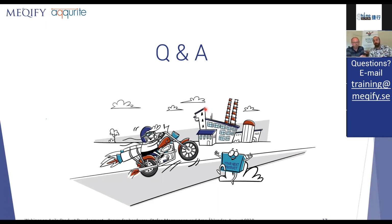You can get a specialist on that on the review. So the reviews in hardware usually feel a bit different. A review in software is you have discussions with the customer or the customer representative: is this something that's good enough to release? In hardware, it's more, okay, we have these results. What is the best value we can get out of this team in the coming 2 weeks from what we have learned?